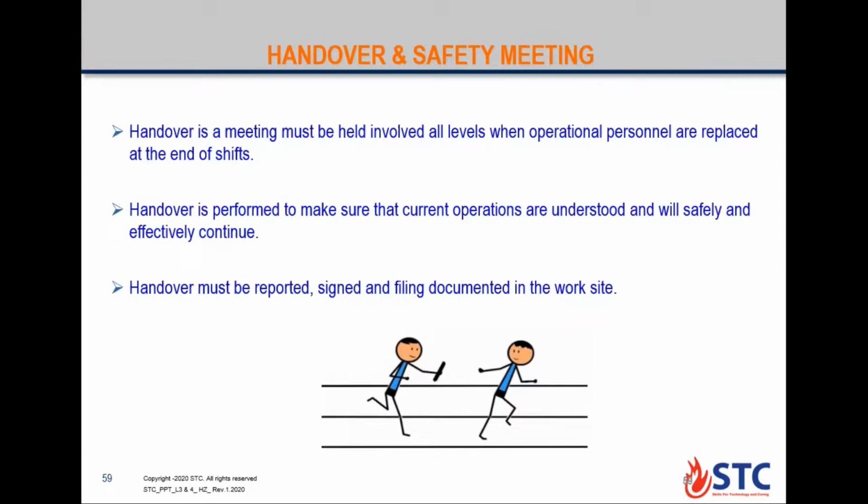After you accept the handover, anything after that is on you. Like when you hand over a well from the production people to the well intervention crew, or the reverse. If you accept the handover, everything after that will be your responsibility. That's why the handover must be reported, signed, and